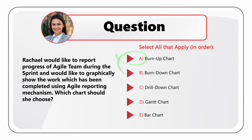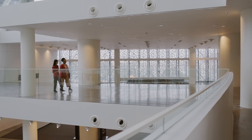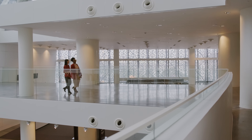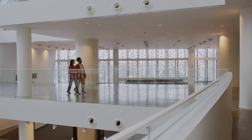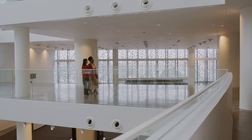Now let's look at the incorrect solutions. Choice B: Burn-down chart. Even though the burn-down chart demonstrates remaining work, it is not the correct answer here, because Rachel is looking to show completed work, not the remaining work.